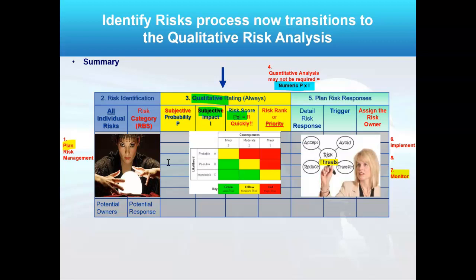The advantage to a category is when you group risks together, you can use common responses for multiple or different events. You're also identifying potential owners and potential responses — your risk register should list most of those things as well. We do a qualitative analysis always, so every one of these individual risks goes through qualitative analysis. It's fast — yes, it's subjective, but you're an expert.